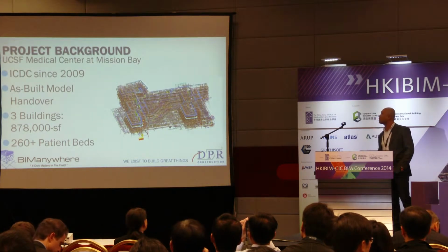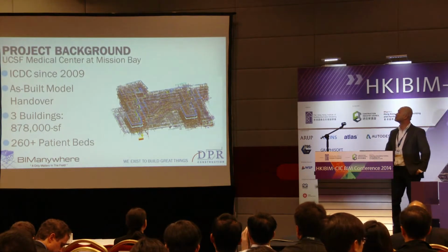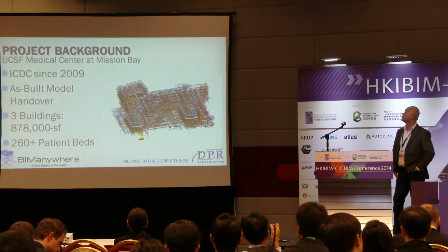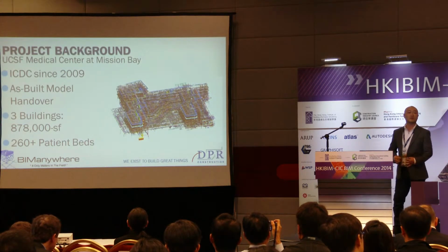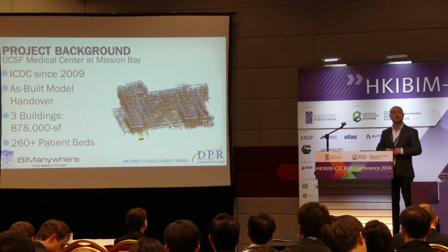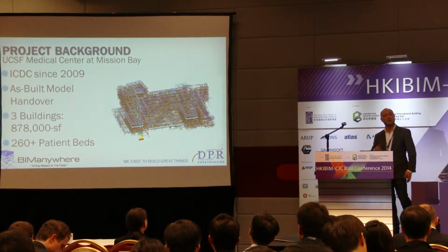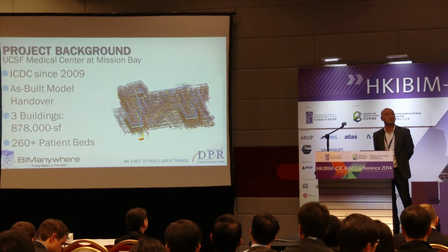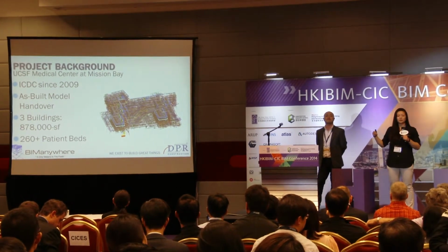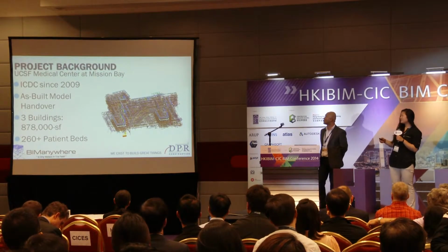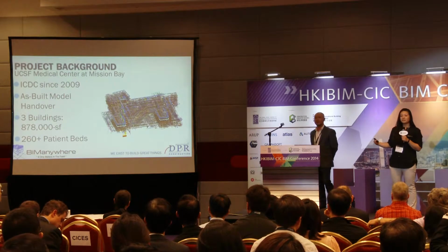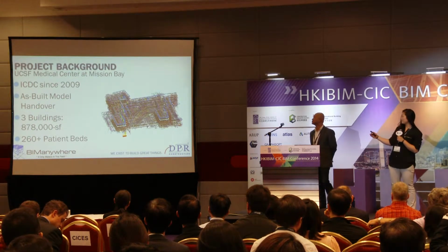We have something set up called an ICDC, the Integrated Center for Design and Construction. That's pretty much a big trailer space where we have the architects, the consultants, the general contractors, so that's DPR, and then all of our subcontractors all working in one central location. And we've had that since 2009. So one of our requirements to the owners is a handover of an as-built model.